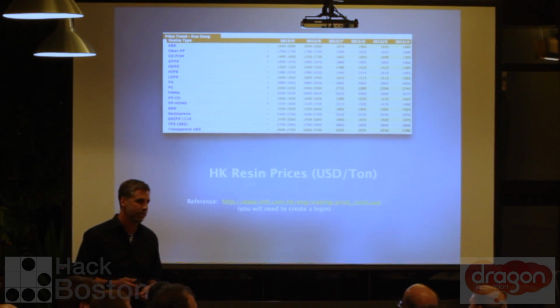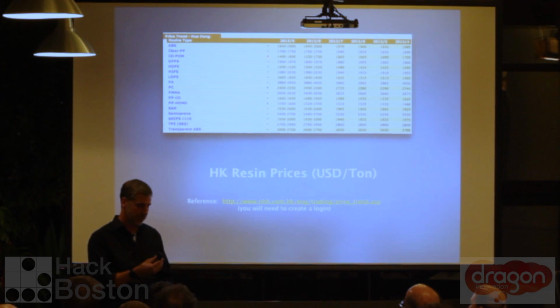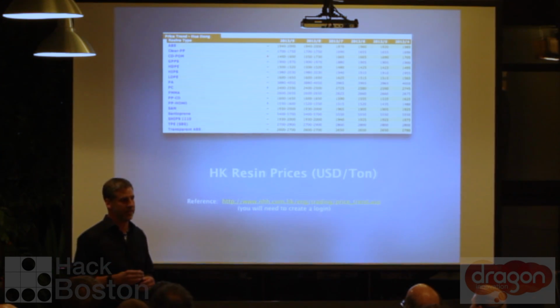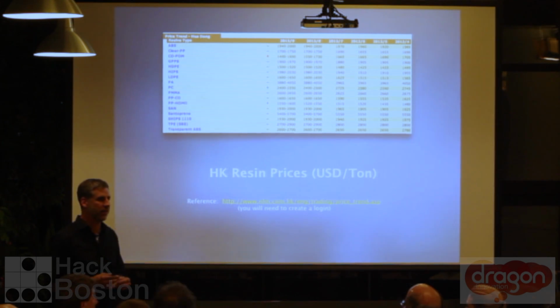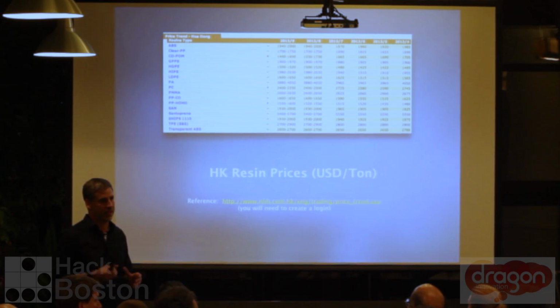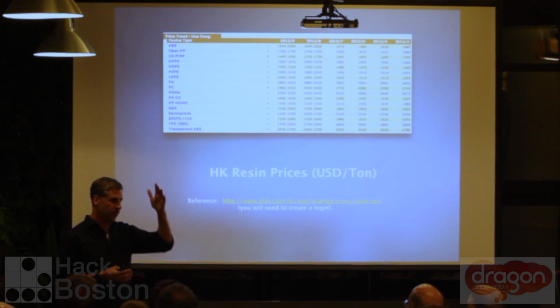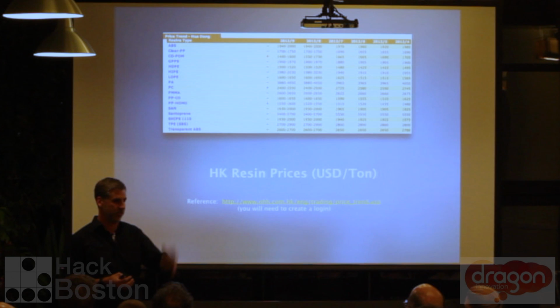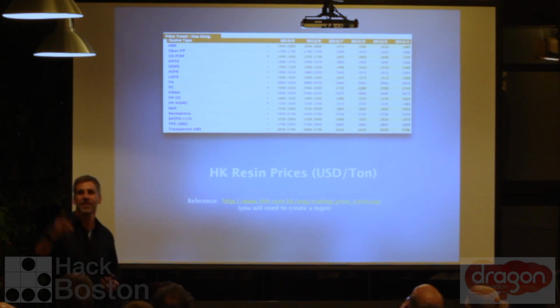How does that compare to US pricing? Yeah, so if this was $4,000, I'd bet this would be roughly a $16,000 tool in the US. And again, these are just very broad figures, thinking about it for about 10 seconds, but it's probably not too far off. Four times, that's usually what I figure. In the US, and I don't know too much about tooling here, but we use mud frames, so it's really just the inserts that slide in and out, whereas in China we use mold bases, so it's this whole giant chunk of steel.